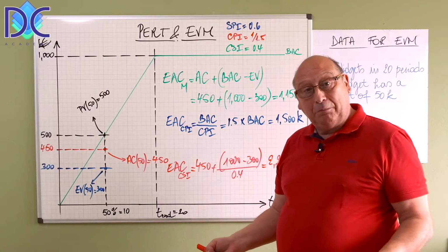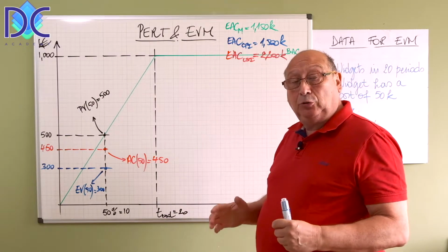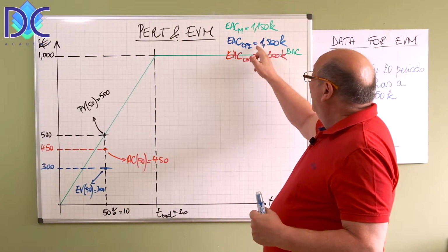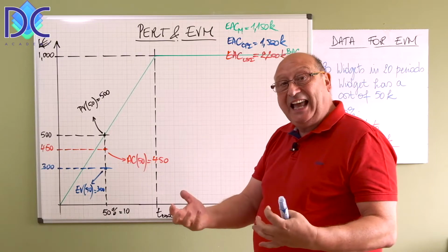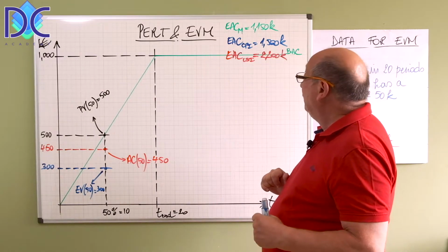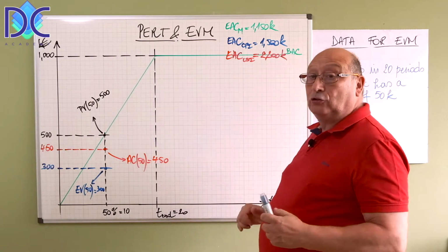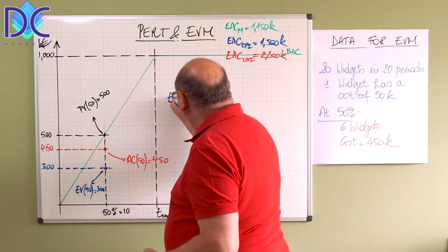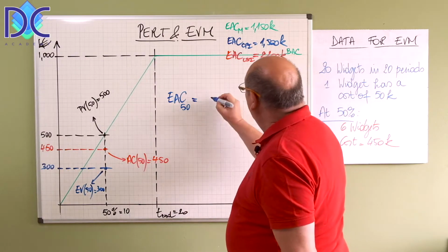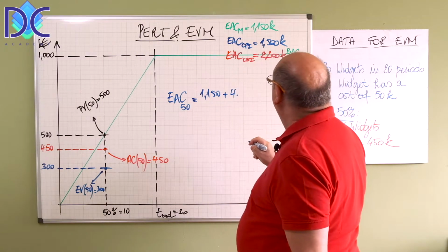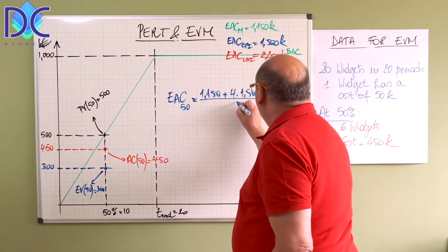So these are in fact the different calculations that we have, and we can use those to apply them on the PERT or the 3-point method. With the 3 estimates that I calculated before, the optimistic estimate, which is 1,150K, which is also the mathematical estimate, the probable estimate based on the CPI, where we continue with the same financial performance, it's 1,500K, and the pessimistic, when we use the proportionality factor, the CSI, we find 2,200K. Now with this, I can calculate the estimate at completion at 50% probability, which is the optimistic, 1,150, plus 4 times the probable plus the pessimistic, and we divide this by 6.